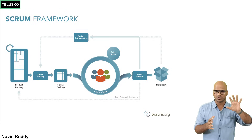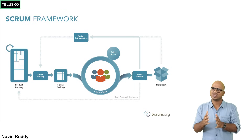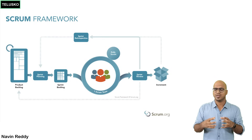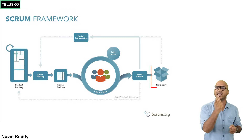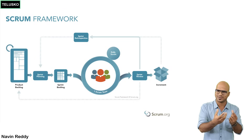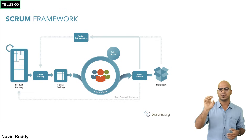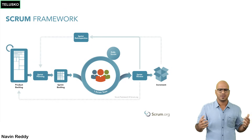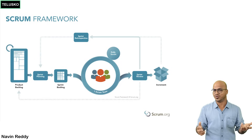The Scrum team is not a big team. As discussed in Agile, you need a small team — around four to eight people, with six to seven being the average. After the first sprint — say, two weeks — you produce the first increment, which is a potentially shippable product. For example, if building Facebook, the first increment might be a page where you can post and see feeds — not the full Facebook, but something deployable.